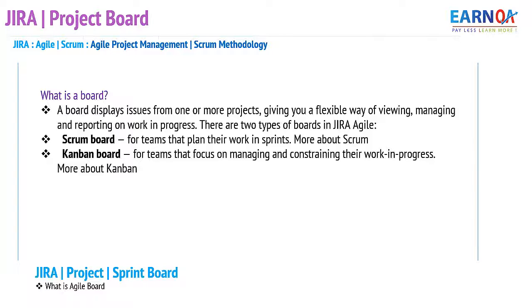Whereas Kanban is intended for non-fixed length or longer projects like call center, system support, or customer support. These projects have no deadline. It may go 2 years, 3 years, 10 years, or a lifetime. In such long-term projects, people prefer to use Agile with the Kanban methodology. Whereas software projects with fixed length, maybe 1 year, 1.5 years, 6 months, or 2 years, would go into the Scrum based implementation.